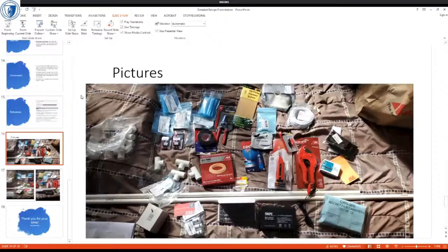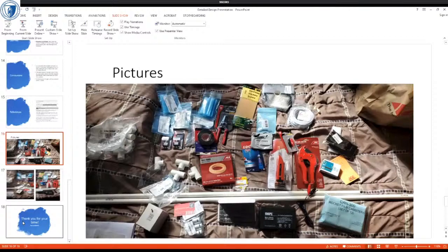So for example, the 3D printer from the Coffee King project would be a capital expense. Same with the tools, the PVC cutting tool, Jamie. That would be a capital expense. It would still be counted against the project, but not the whole cost. So that's usually the way companies work, where you've got an expense that needs to be made for a project but has a life after the project. That's usually a capital expense rather than part of the project expenses. Okay. Got it.